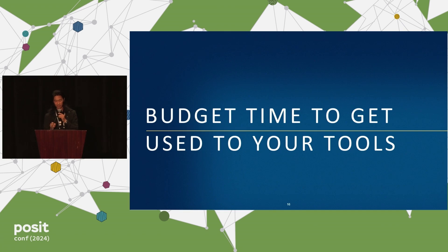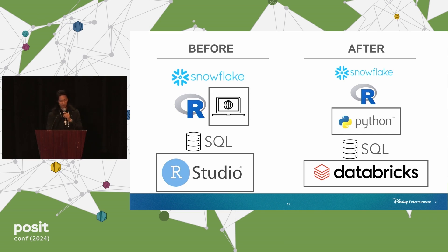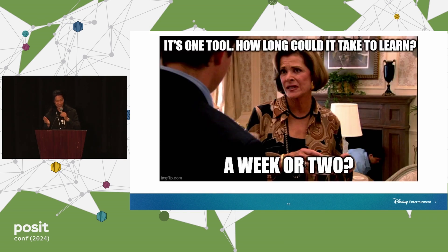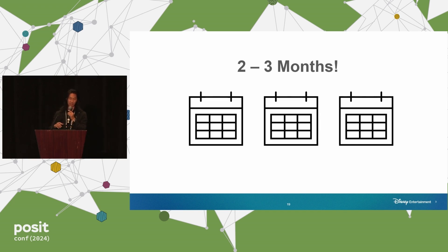The last lesson is to budget time to make use of new tools. Before, we just had things on our laptop, and adding in Databricks would take some time — but we were committed. I thought, how long could this take? Maybe a couple of weeks? It turns out it took nearly two to three months to go through all the quirks, refactor our code, and get used to Databricks.